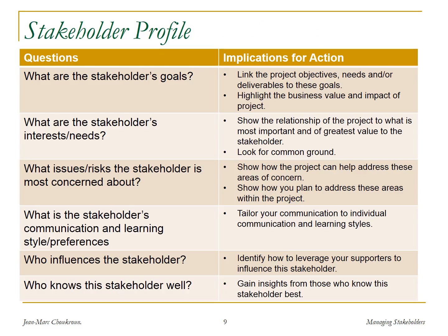So what are you going to do in a profile of a stakeholder? You want to understand what their goals are. And so in terms of an action plan, you can link the project objective to their own goals. Sometimes they're opposed to the project because they don't necessarily perceive the real goals of the project. And when you reframe the project goals in terms of the stakeholders' goals, you may find that there is in fact more of a common ground. What are their interests and needs? Again, you can look for ways in which the project is actually supporting that.